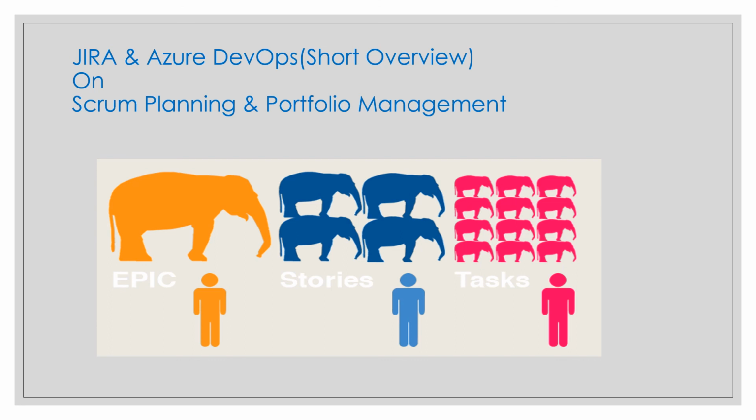When you are putting out one release, what will you cover? You will create a version. You'll create a version. What should be there? The start date should be there, the end date should be there, the version details should be there, what all issues you have done in that version, that sprint, should be there, and the filter of that version will be there.